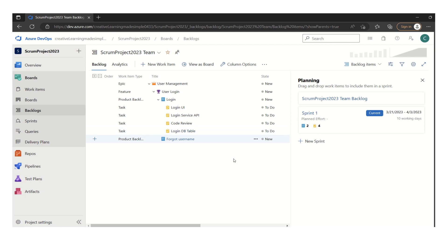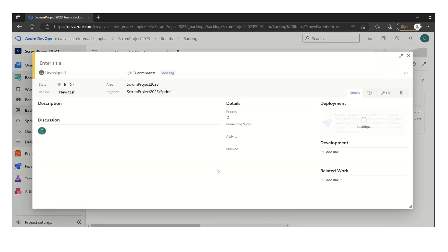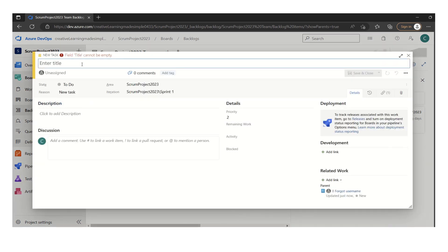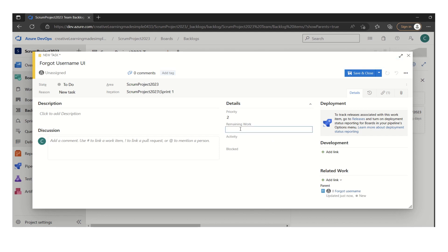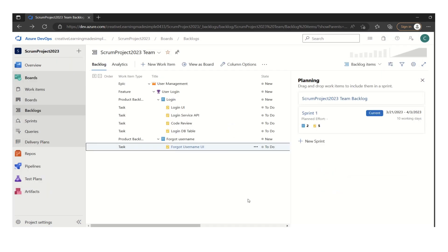And when the teams are doing the planning, if they want to come up with creating a new task, they can always do it from here. Let's say forgot username UI, and this is a task and it is going to take six hours. We can save and close. So it will define our task here.